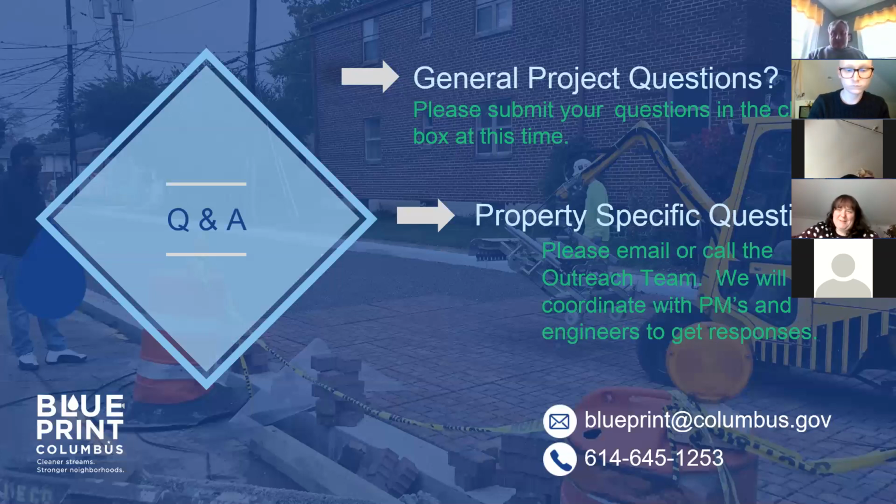And Leslie, I will add regarding the curbs, it's really at about this stage of plan development that we start coordinating and reaching out to Public Service to see if they would be interested in partnering with us as part of our project to replace all of the curbs along the street, due to that lack of reveal and the fact that we're going to be installing rain gardens and transitioning from sandstone to concrete back to sandstone. Our new concrete curbs will have a 6-inch reveal, and it would eventually transition down to a 0-inch reveal at some point on the street.